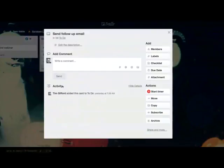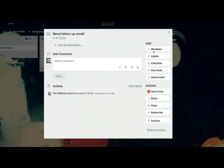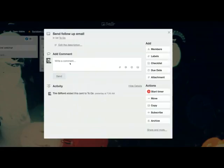On this demo mock-up I've used a very straightforward to-do, doing, and done list. You enter the information on each ticket in the to-do list, then move it across to doing when you're actively engaged with it, and push all those tickets across to the done list when finished. You can then archive them and clear your plate for the next batch. Each ticket allows you to enter a great deal of information: the title of the task, descriptive content, you can add members or assign it to somebody in your team, add labels by task type or project, add checklists and due dates, attachments — images, video, audio — and have a back-and-forth commentary on the ticket as well, with comments describing what has been done.